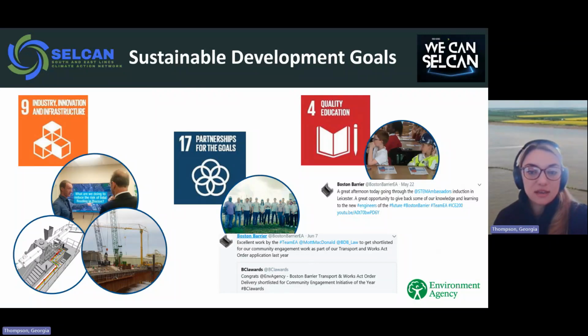So number 12 is responsible consumption and production. We've enabled various savings to be identified through the project, through things like reusing the dredged material taken from the bottom of the river Haven. We used that to cap off a local landfill site. If we hadn't, we would have had to transport that much further. So by talking to people and realising that we could cap off that local landfill site, it avoided the need for over 30,000 lorry movements, therefore also contributing to UN SDG 13, which is climate action, by reducing emissions.